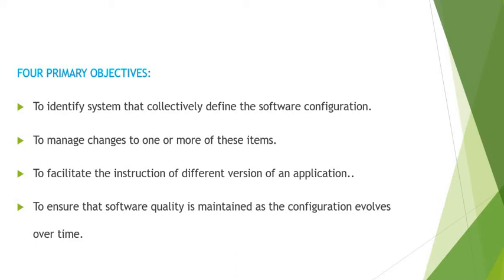Change requests and problem reports for all configuration items or units are initiated, recorded, reviewed, approved and tracked according to a documented procedure.